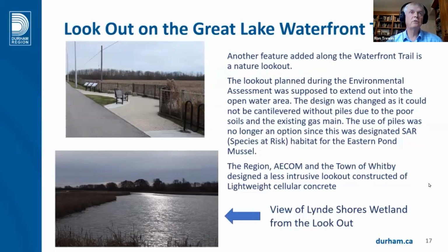The use of piles was no longer an option because of the species at risk and the eastern pond mussel habitat. The region and AECOM instead designed a less intrusive lookout using lightweight cellular concrete. The finished product is the view from this lookout. Just absolutely gorgeous.